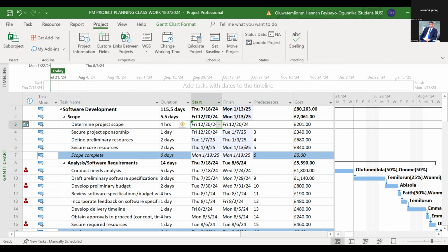So if you have any holidays, Easter holiday and all of that, you can always put all of that in your calendar and make your calendar obey that. So that is a standard thing you need to do on all your projects. When you get on a project, you need to understand what exactly are the New Year holiday, Christmas holiday, bank holidays, any shutdown or fallow within your stuff and all that. You have to make sure that you build all of that into your calendar.